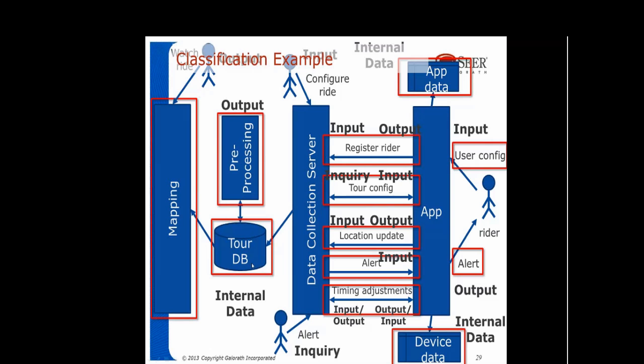So this gets to the idea of what is the application boundary. Well, as you can see, I've decided that the application boundary here is each major component of the system. They're being built separately. If you were to count only that app that we counted on the previous screen, you'd have an input and an output, and that would not represent the entire system.